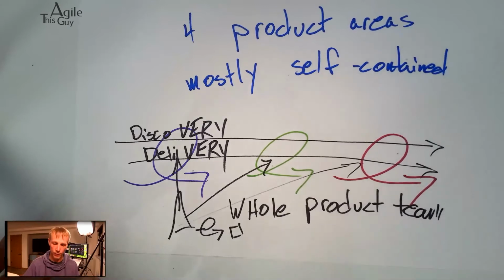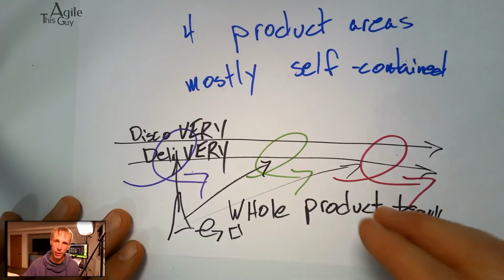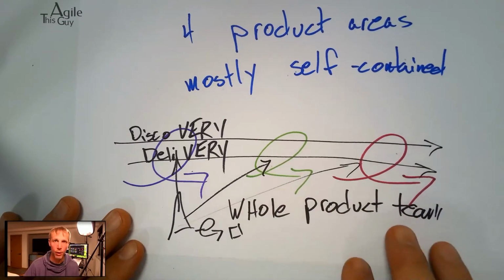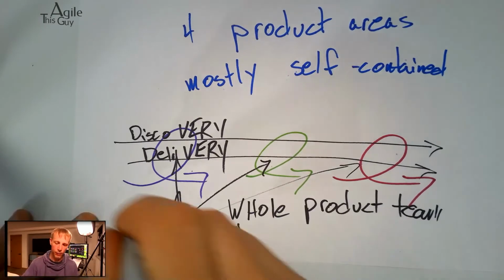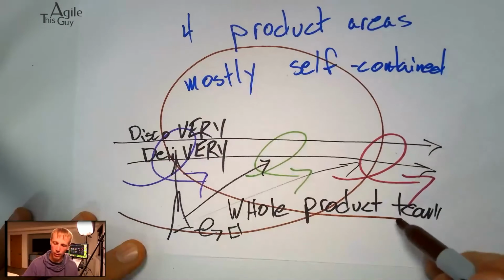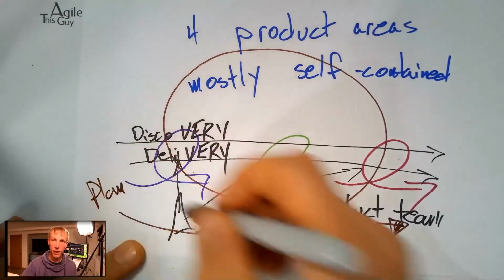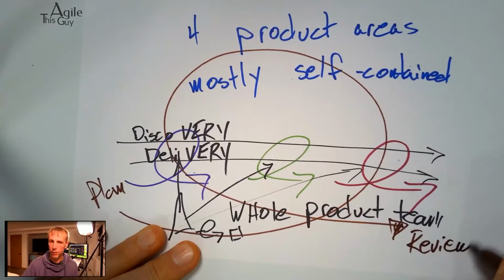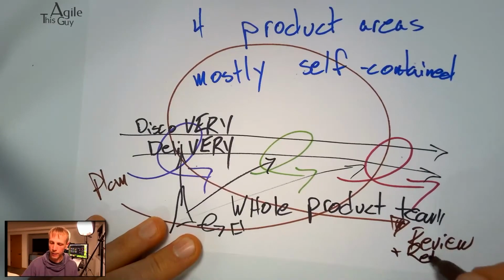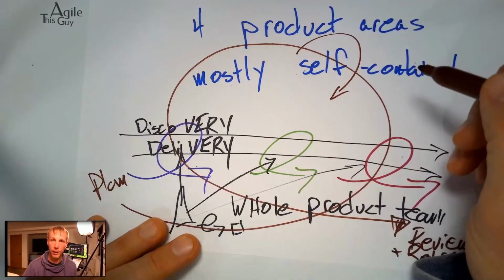And then what evolved around that was a coordination across all of this with things like big room planning to think through the next series of sprints. And so you start to see the evolution of really a bigger framework around all of this, with planning to start off across these teams, the review and retro at the end of it, and then a meta stand-up on top of that.